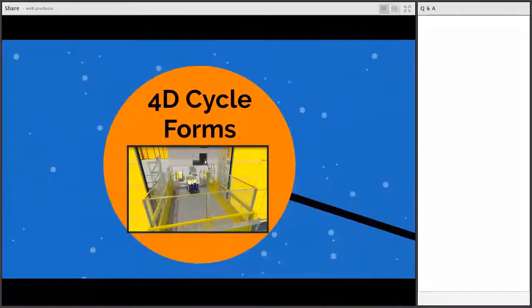So that's where you're getting into that little bit of too much delivered early, hanging on to stuff for too long, taking how big of a cushion the job site has, reducing that down a little bit because you're confident that you're not going to come to that last pour and run out of wall panels or post doors.